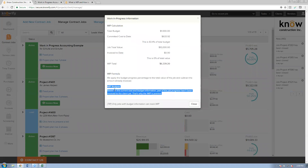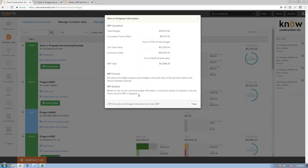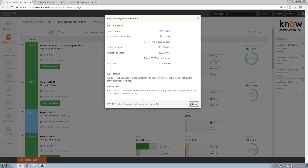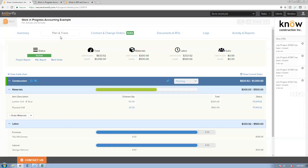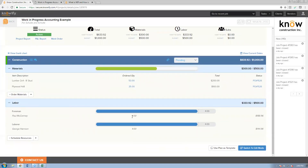Even off of what Tanya was saying with over and under billing — based on current cost and budget information — we show whether you've invoiced enough to match how much expense you have. That's why you have a positive WIP. Whereas if I've overbilled on a project it shows a negative number, and that's actually a reassurance — you want to see a negative number in that situation. To give you more information on what's building up this number, I'll open up my plan and track section, which is my cost tracking center in Knowify. Here I can see cost to date versus budget, broken down into material cost versus budget and labor cost versus budget.